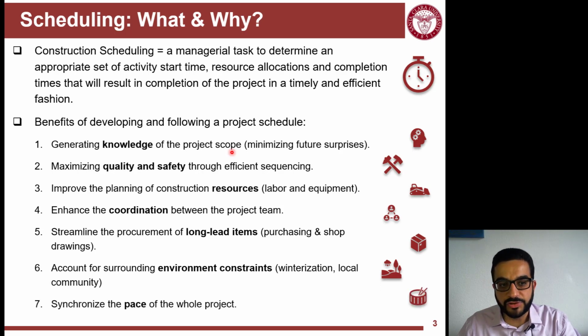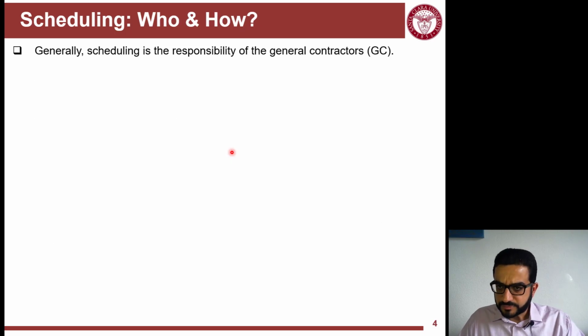And finally, a schedule is generally good to synchronize the pace of everyone in the team. So there is no one super achiever while the others are struggling with their activities, because that super achiever is not helping anyone. They're just doing the work and creating inventory and waste in the project that causes problems more than it actually helps the project as a whole and the team. So schedules have a lot of benefits, and these are just some of them.